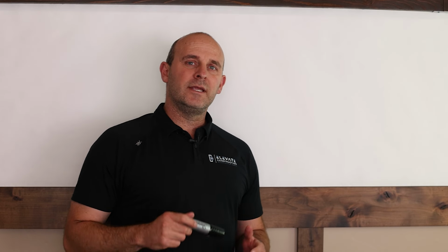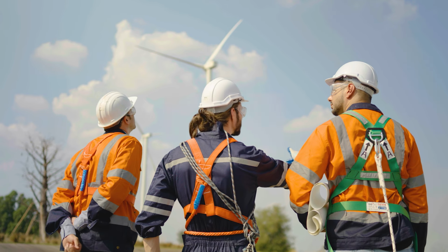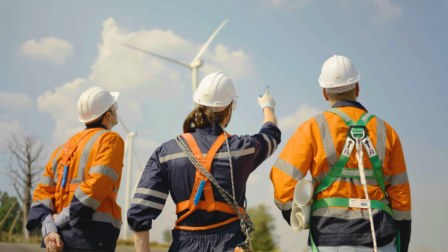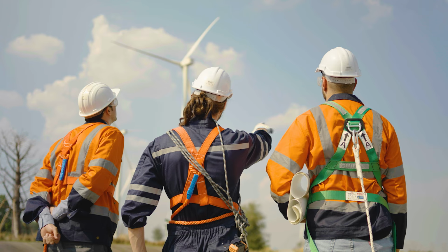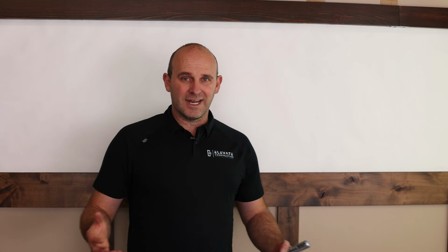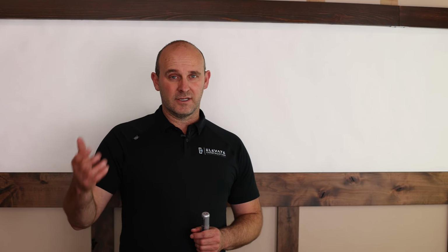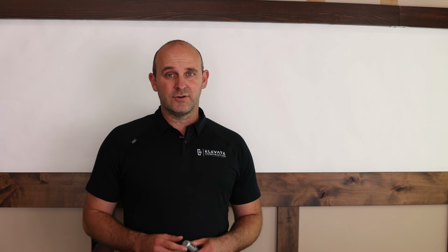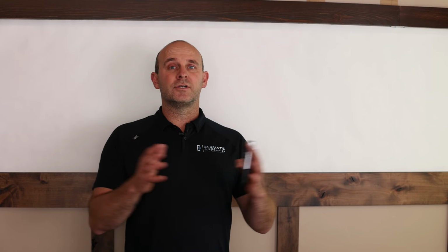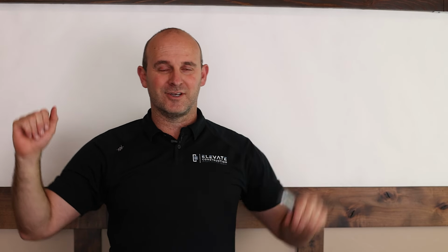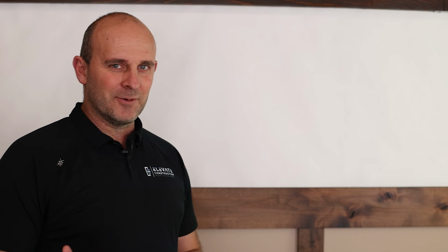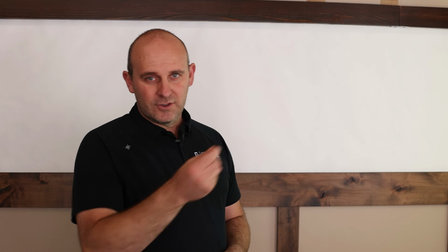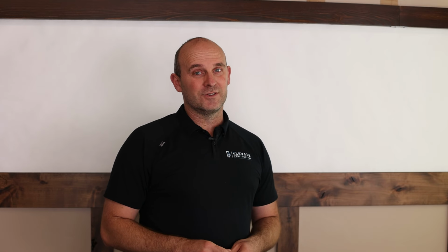I remember working for a really great general superintendent, and I don't mind mentioning his name, Scott Berg at Hensel Phelps. When he was teaching me how to be a field engineer, he was like, Jason, early on, I need you to study the civil drawings, obviously for the perimeter of the foundation, and the structural drawings. Then when we were starting to get out of the ground, he was like, Jason, it's time to now start studying the architectural drawings, the MEP drawings. And I was like, okay. So he really understood the phasing of all this and how to take this elephant and eat it in bite-sized chunks. Not that I would want to eat an elephant, but anyway, you get my point. Bite-sized chunks.